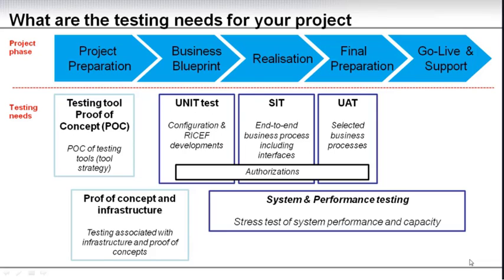System and performance testing. This you can basically do as soon as your system is built and ready. And normally you have all your system environments ready during the last part of business blueprint, beginning realization. So this is where you can start executing this. You want the business blueprint to be concluded first, because you want to use the real business transactions. And normally if you are using customized program, those won't be built until during realization phase. So that's probably where you'll be able to start this with the best result.